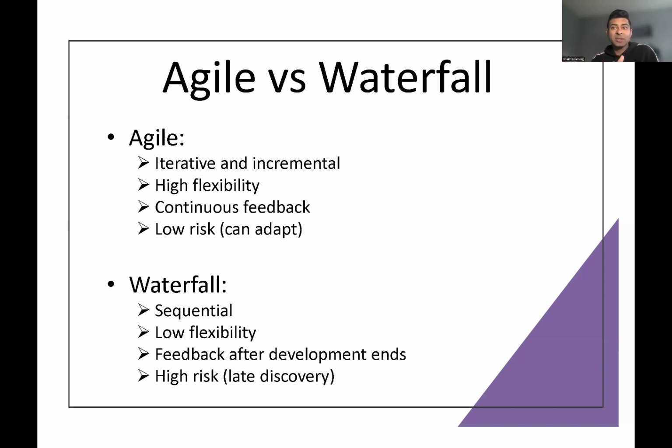Waterfall is sequential. First, there are phases, and one phase has to finish before another phase starts. So first you are gathering the requirements, and then you can't start the development till the requirements are done. But in agile, take an example, after 2 weeks, if you create a product, you show the product to the stakeholder. If he says he's not happy, you can again gather the requirements, but that doesn't happen in waterfall. So that's why it's sequential.